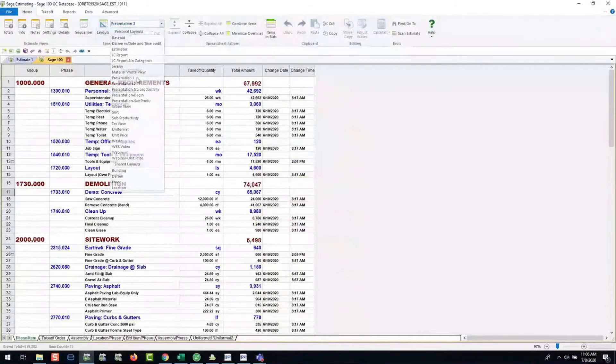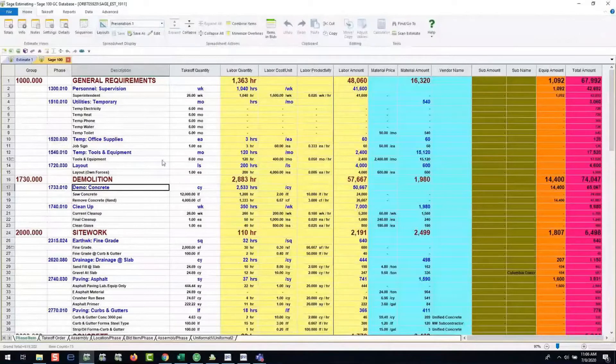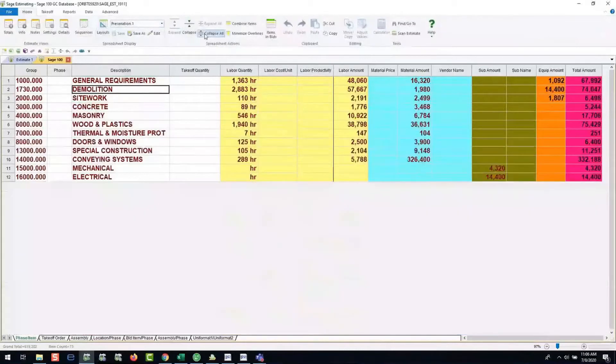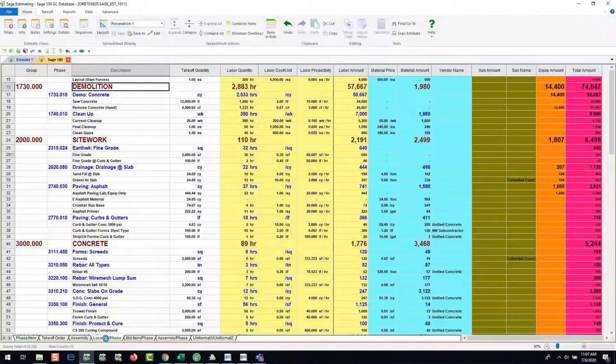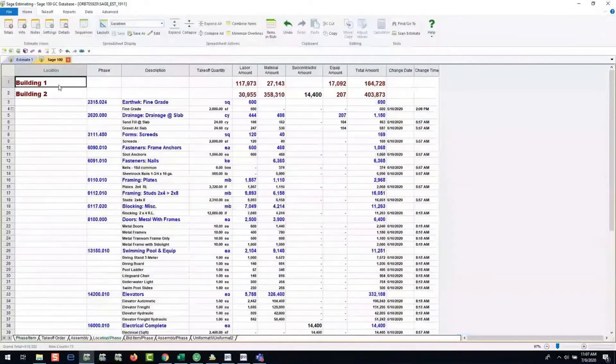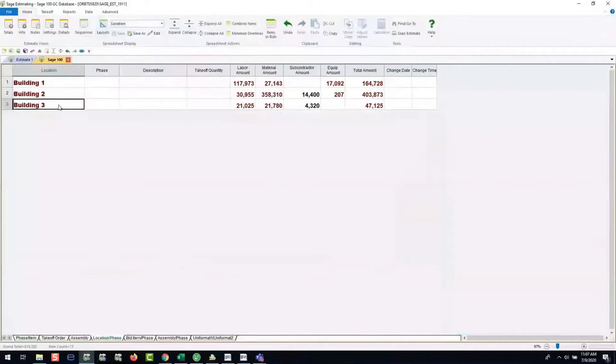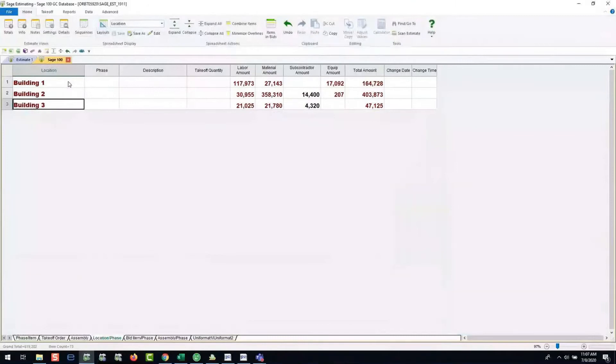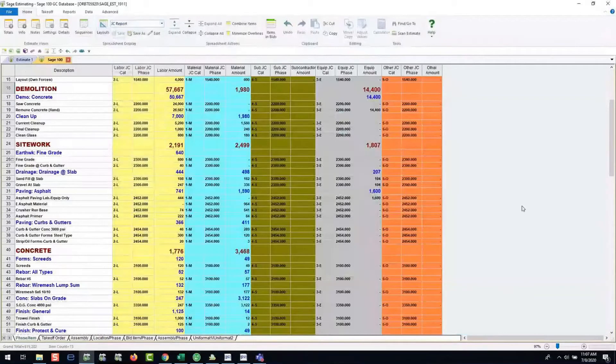Let's jump back into this presentation mode right here. The other thing is for an estimator to be able to break out the details in a manner that makes sense to the project. So in this case right here, what we're looking at is CLAPSO, 16 division. If you're on the 48 division, good for you. We're slowly creeping, glacially creeping to everyone using the 48 divisional breakout. And I mean really slowly, but when we look at that, maybe we want to see it in a different manner. Maybe we want to break it out by phase of project or by building or could be floor, system, you name it. But you can break it out and flip that switch to that breakout in a manner that makes sense to you. Now, what's wonderful about this downstream is we can report on it in the same exact manner to whatever detail you want to go to.